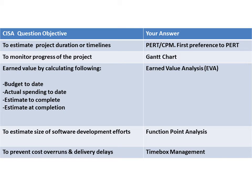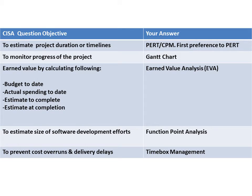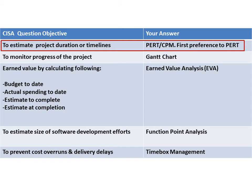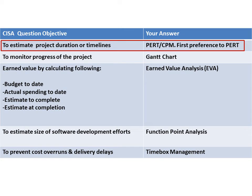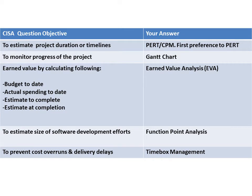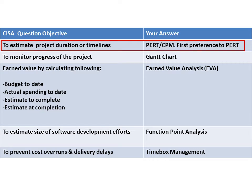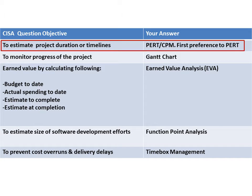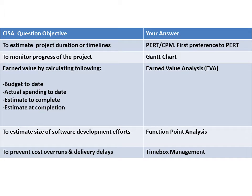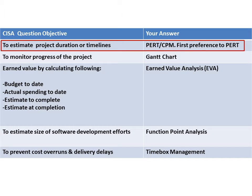Let us understand exam question objectives and our answers for the same. When our objective is to estimate project duration or timelines, our answer should be PERT or CPM. First preference should be given to PERT.